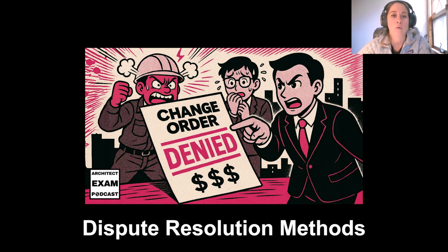Mediation can take 1 to 3 months, and it can cost anywhere between $5,000 and $15,000, and that's for a straightforward claim. Mediation resolves approximately 80% of construction disputes. Though it's non-binding, parties must agree to the resolution that came through mediation. Some projects establish dispute review boards at the start of a project, and this is when there are panels of industry experts who provide real-time dispute resolution throughout the project, with advisory opinions that share their expert opinion on the project.